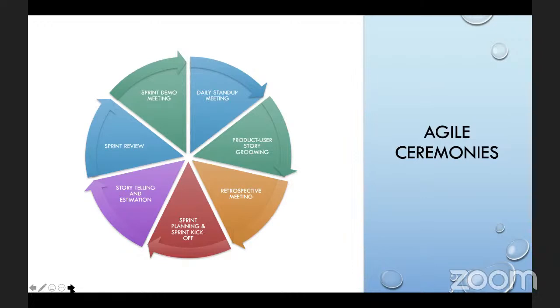So when we are planning a sprint, we look and aggregate and add all the stories that we want to build, and then we make sure that it does not exceed our sprint velocity, right? So if our sprint velocity is 30, once we start adding, we pick up the donate page button. We say that that story is a 5-point story. Okay. We say the media page, that story is also another 5-point story. So what do we have? 10 points. So we begin to add up. We begin to add all the features that we want to build,